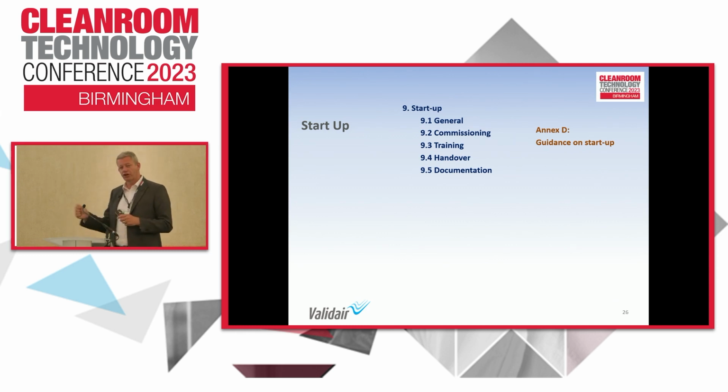This is startup, so it's starting up all of the utilities and all of the services, etc., to start up and commission it. So the startup deals with commissioning, then it deals with training and handover. It doesn't deal with production. There's a part 5 of 14644, which is operations. That deals with the period after this. So that's what this part of the standard